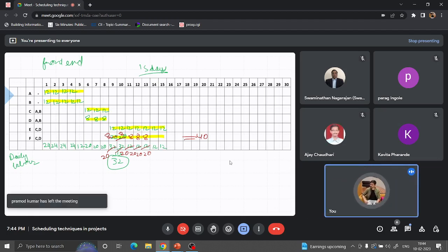It might also happen that when you are getting laborers on site, you have a labor contractor who has a limit that I can supply only this number of laborers. Or you might have the condition that your site is quite remote, so you are taking 100 laborers there for a whole week. You have placed them there, so you don't want to waste your effort that way, like the labor is on site and you don't have work for them, or you need more laborers than you can accommodate. So it's better to use resource leveling for that case. These are the most basic, most generic cases.